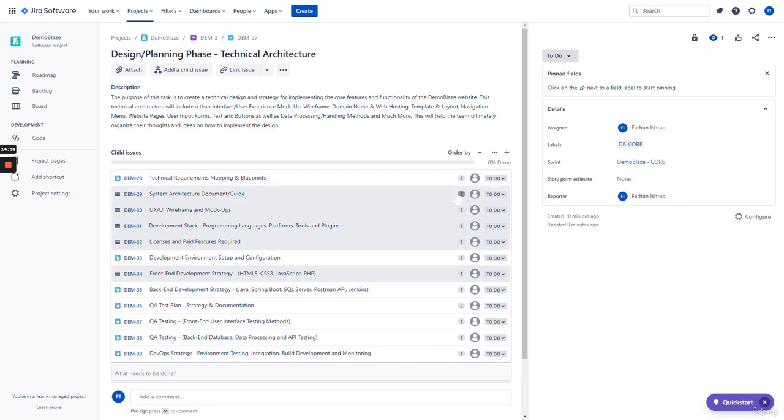So now, if you look at all of these user story points, we can combine all of them and get a total number. So let's see how many there are. 1, 2, 3, 4, 5, 6, 7, 8, 9, 10, 11, 12, 13. So now, this technical task that is part of our epic or our sprint is going to be a total of 13 story points. What this means is that, as you can see here, there's a progress bar that says 0% done.